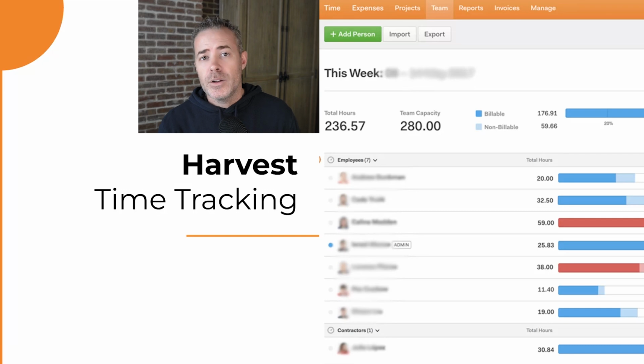They do have an add-on for it that can be used for forecasting and resource management. We don't currently use that. We kind of tested with a demo version of it for a while, but opted out of utilizing it right now. But Harvest is a great tool, and even for an internal team, there could be benefits of tracking time because you can help understand where the budget's going, where the time and effort's going, especially if your team works on several different initiatives. You could create different projects within Harvest, track time against those different projects, and it helps you to understand where that effort's going. You can also add cost to the time, so you can even track what are the costs associated with certain efforts.